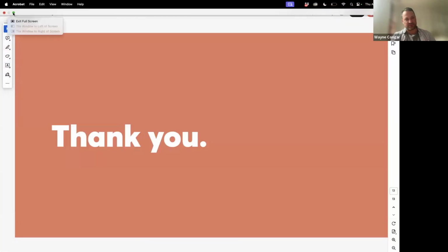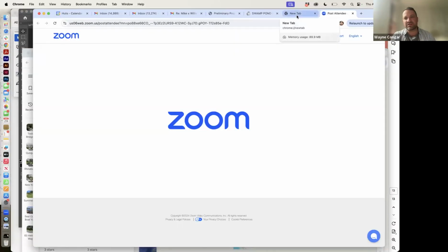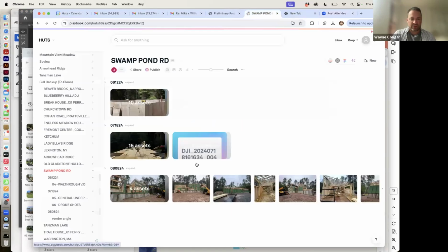And so that got us through what we call our modifications and visualizations, a lot of the interior selections, and getting a mood for the house. This presentation was from September or so. Let's see, we finished modifications around September, October, worked on permit materials through November, December, January or so. And I would say we had financing lined up in mid to tail end of the winter. The contractor was on board and broke ground around April.